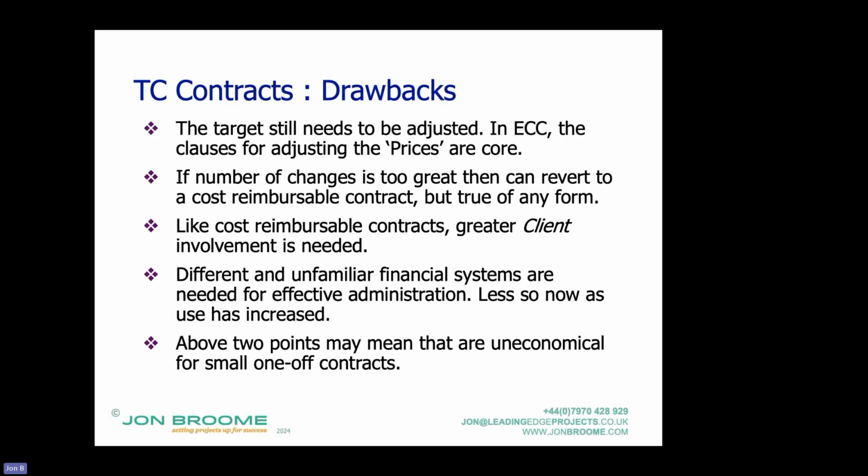Well, if it's a compensation event, arguably the pain/gain share doesn't apply until that compensation event is agreed and incorporated. So the contractor naturally wants to maximize it. The client side naturally wants to minimize it.